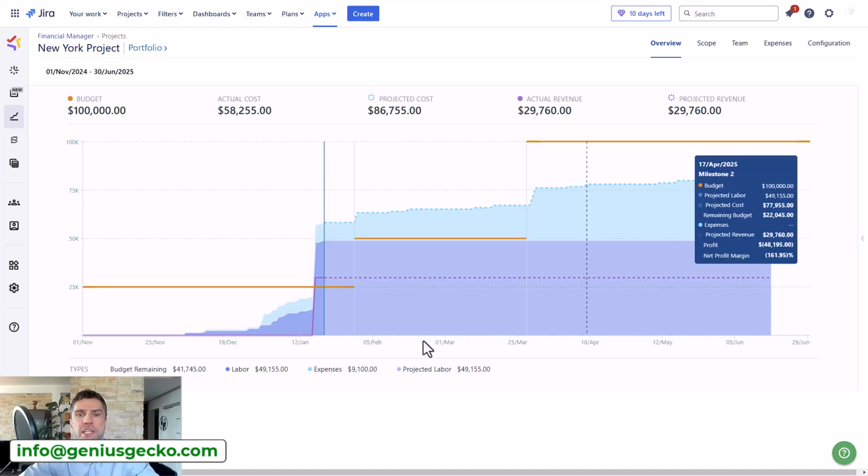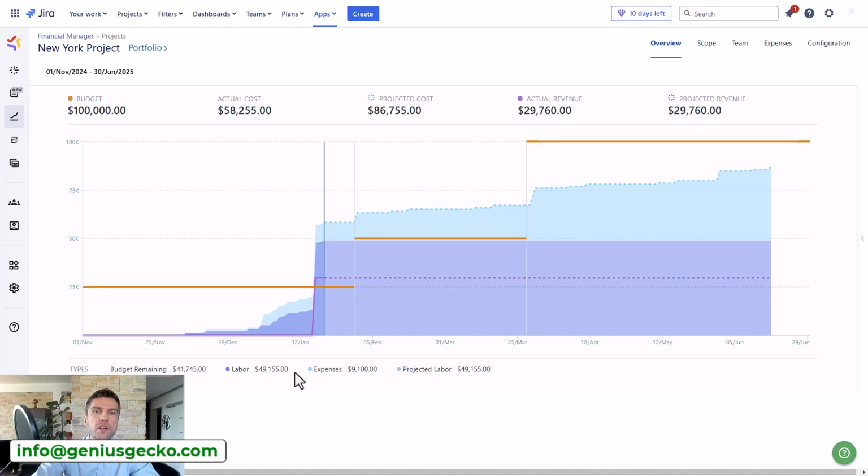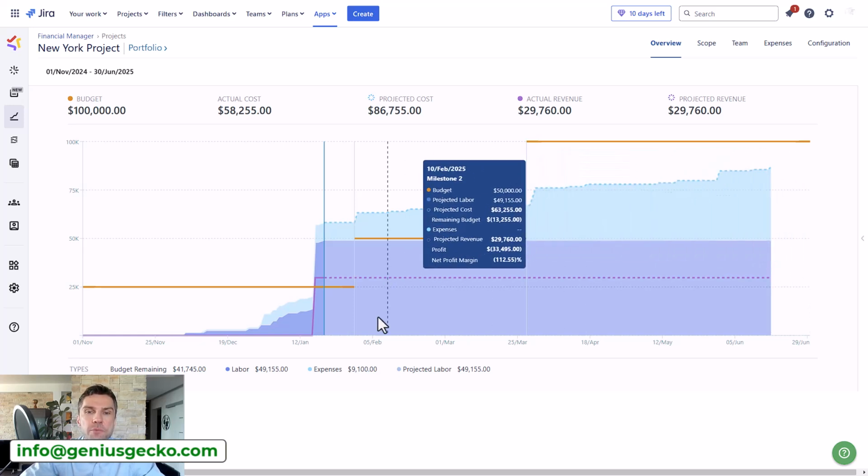The data used here is either the logged work, all the planned effort, as well as the costs or expenses and their projection. On the left hand side you will see the logged work of the time tracking, any work you log on tasks, and on the right hand side you will have the estimated effort or the original estimate of the time tracking.